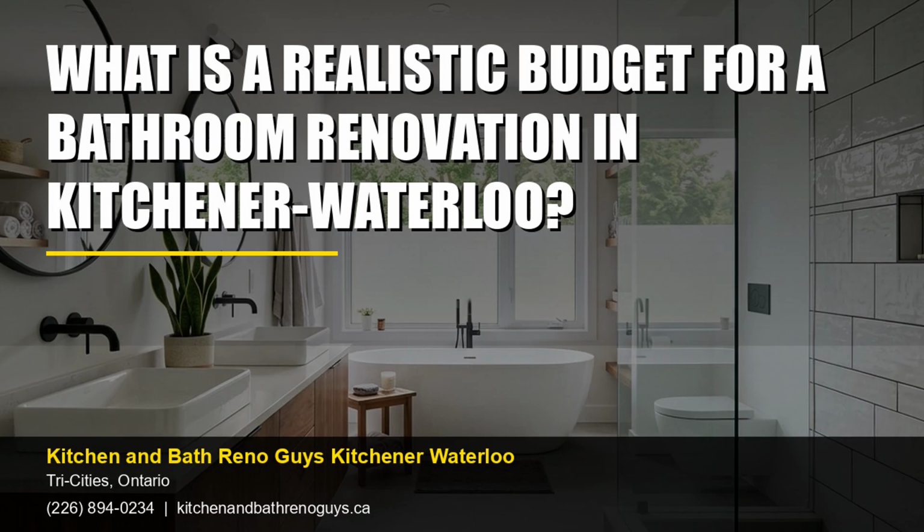Q. How much should I expect to spend on a mid-range bathroom renovation in Kitchener-Waterloo? A. For a mid-range bathroom renovation in Kitchener-Waterloo, homeowners can typically expect to spend between $10,000 and $20,000. This range covers quality materials and fixtures, such as a new bathtub or shower, updated vanity, and improved lighting. The final cost may vary depending on individual preferences and any unforeseen issues that arise during the renovation process.